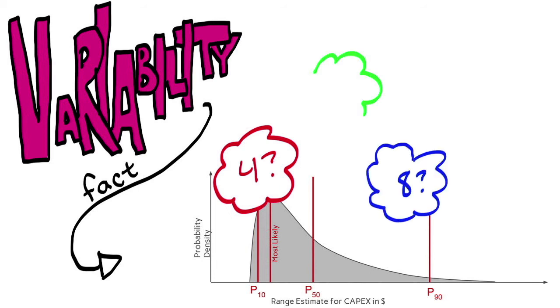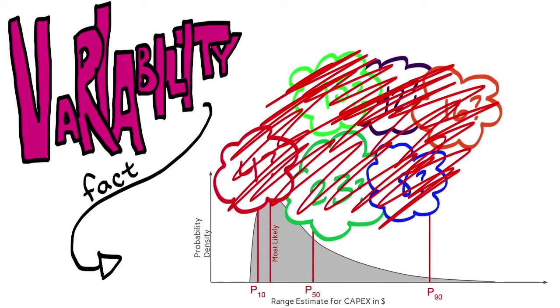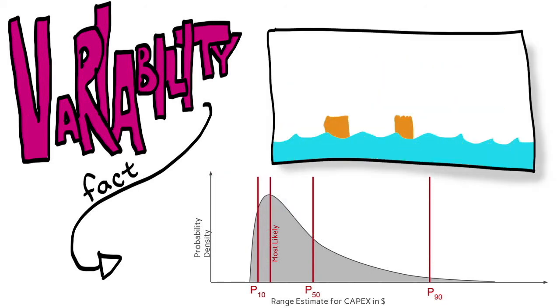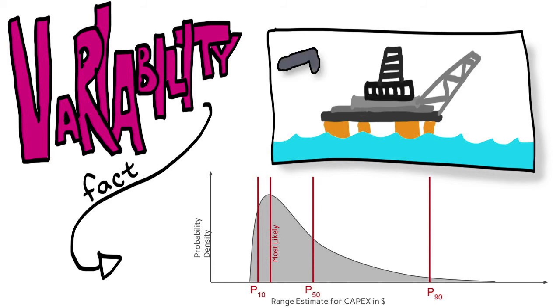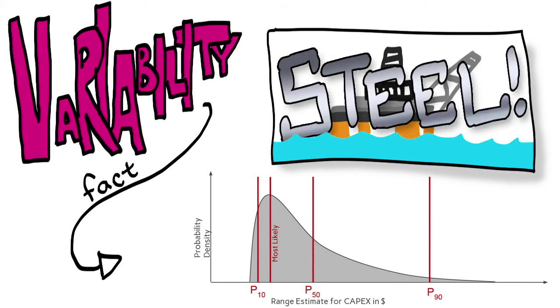Variability is a fact that affects the estimate, but that we cannot put a precise number against. For example, in a typical offshore platform, we know there is significant steel. That is a fact.